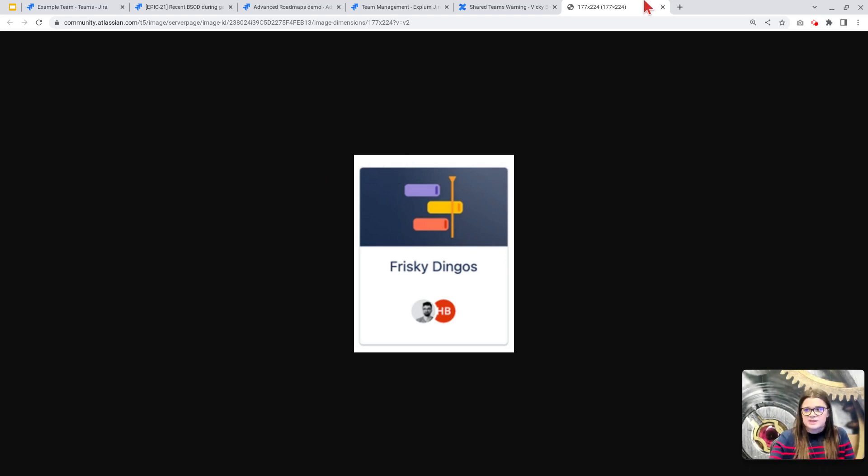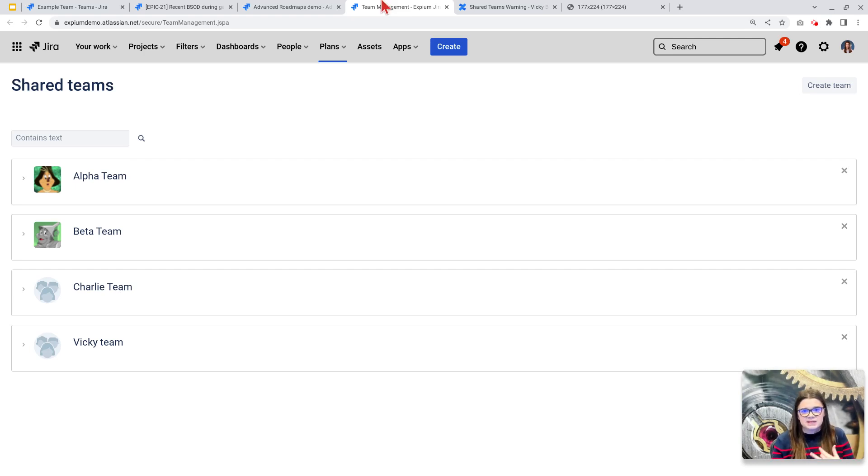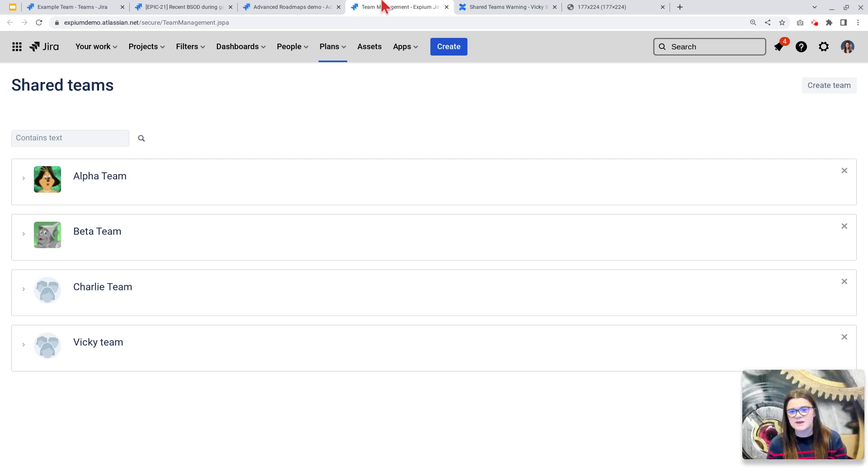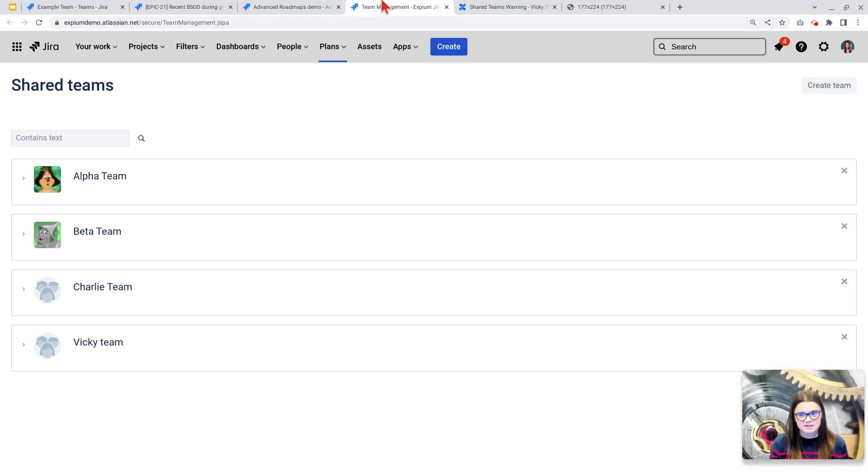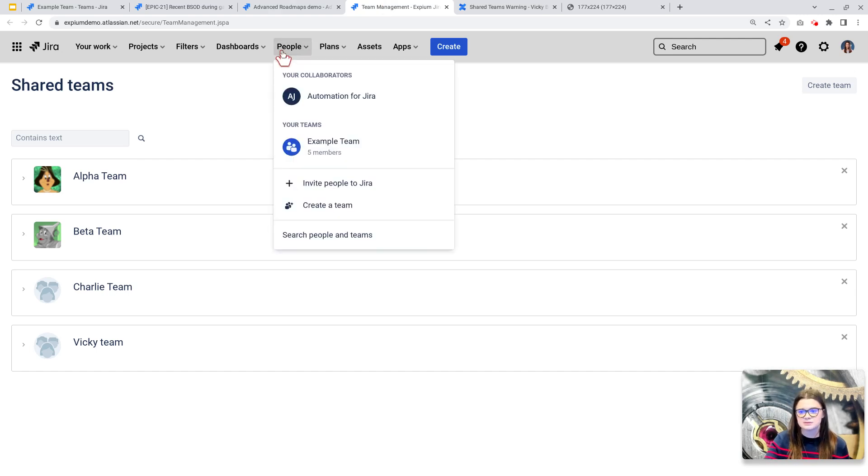A couple other things to just call out. This is not going to have any impact on plan-specific teams. Those teams will remain plan-specific. We will still not be able to interact with them outside of advanced roadmaps, and they will not roll up into a Jira or people team here.